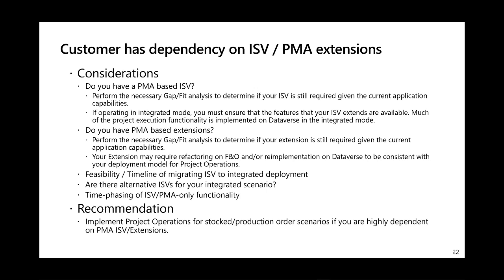In other words, if you can live without that functionality for a while and wait for it to become a standard part of your ISV solution as they refactor to support integrated project operations, then that's great. But you do need to talk to your ISV and understand what they're truly committed to there, with a reasonable buffer. You plan very conservatively if you need to take a dependency on anything in a roadmap, and that would be whether it's our roadmap or an ISV's roadmap.